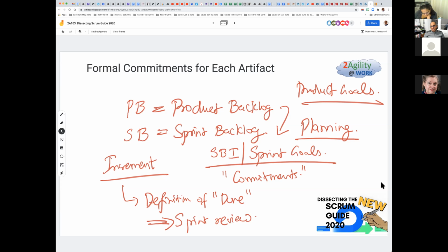A couple of sprints later, you might have a beta version of the hardware, and your definition of done would be, instead of running it on the emulator, now I'm committed not only to test it on the emulator, but also on the beta version of hardware that the hardware team has provided to me, so that the software is validated as working on the hardware that we are building to ship, including the actual sensors on Fitbit. If you have something like a heart rate sensor, or a step counting sensor, or a SpO2 sensor,